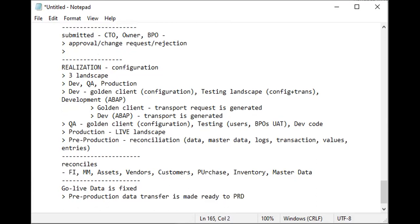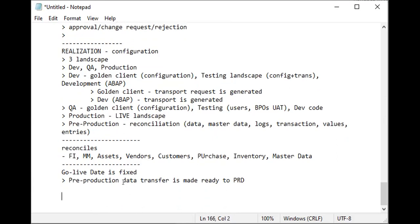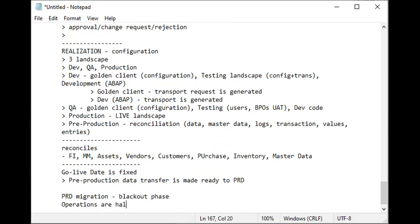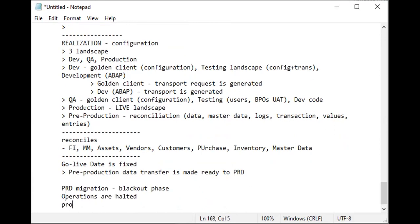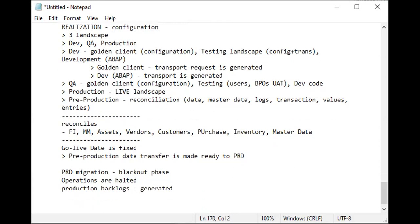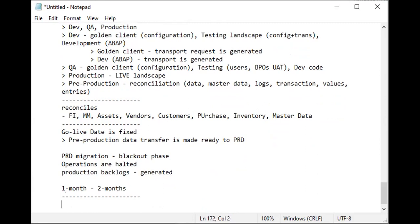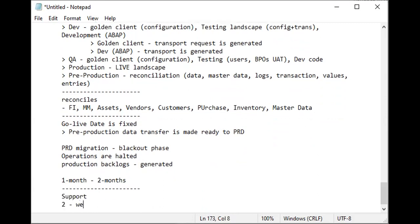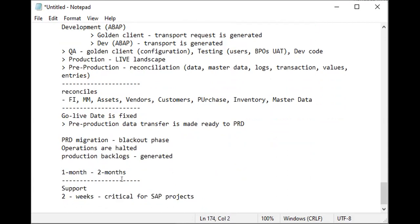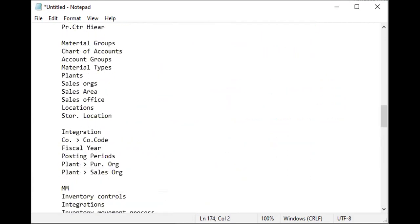After the go-live date is fixed and made ready to PRD, when the go-live date is near, there is a blackout phase. In the blackout phase, operations are altered and production backlogs are generated. More backlogs means more documents will be generated that will have to be completed within one month or ten days, or whatever—one month or two months, that depends. After that, support starts. Two weeks of go-live are very critical for SAP projects, and that's how you complete a work.